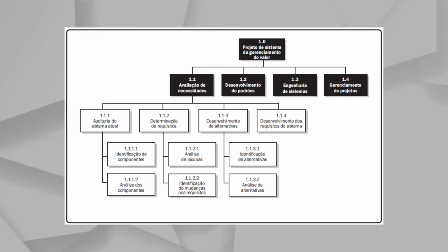If the first one had 2 other levels under it, they will be 1.1.1 and 1.1.2. This rule goes on and on, and Microsoft Project creates this structure for you automatically. So if you are using Project and trying this for the first time, you will be just fine, because Project does this automatically for you.